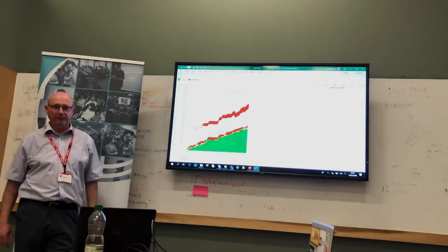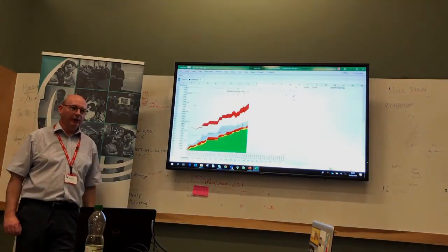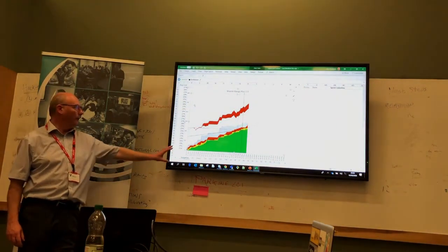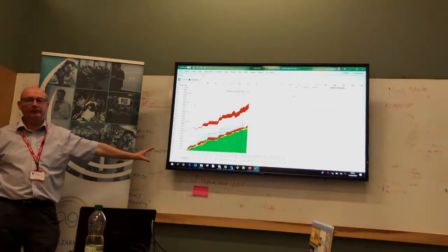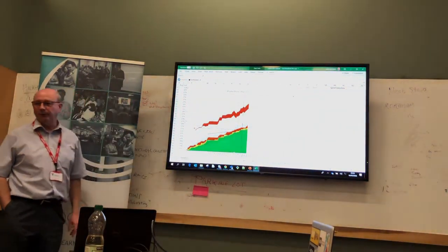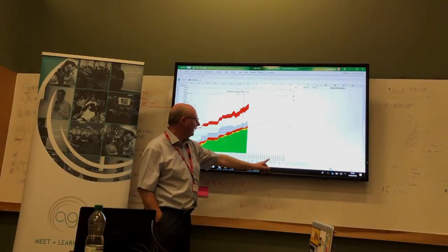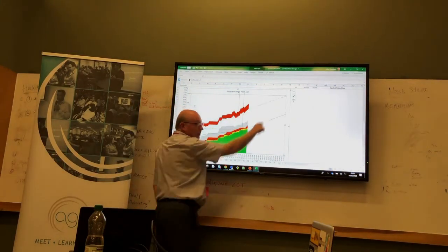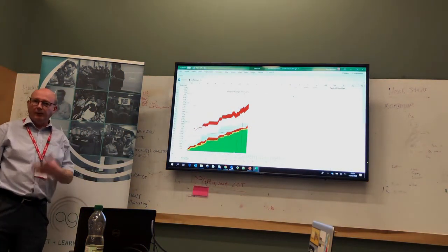So a little bit of horse trading, and we managed to agree with him what we could deliver in time, rather than just saying, no, we can't do what you wanted. And the great power of metrics is that you can have that conversation. And the fact that the team estimates consistently means that we're not telling fibs when we make that extrapolation, that when we get to the end of April, we're going to be about here. The backlog will be up here by then, but at least we'll be doing the most important things, and that's the amount of points we've got for it.